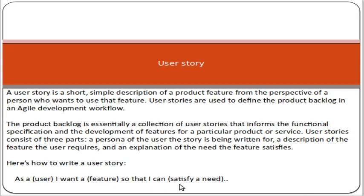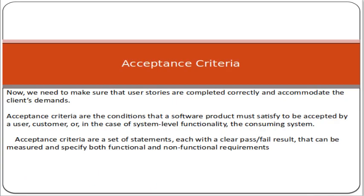The other important thing is acceptance criteria. Whenever we are writing a user story we must also define the acceptance criteria. Acceptance criteria defines on what basis we shall say that the requirement of the customer has been fulfilled. When a user story has been completed, we use the acceptance criteria to decide whether the user story has been successfully delivered to the customer. Acceptance criteria are the conditions that a software product must satisfy to be accepted by a user, customer, or in the case of system-level functionality, the consuming system.